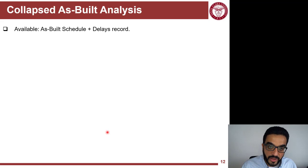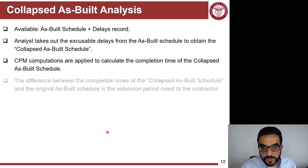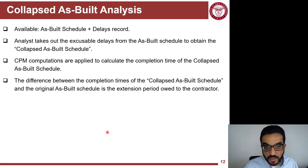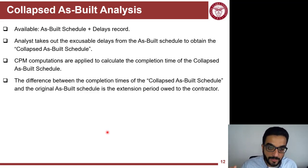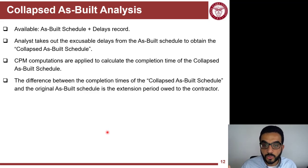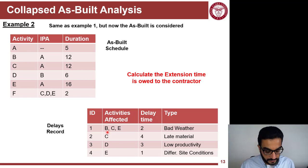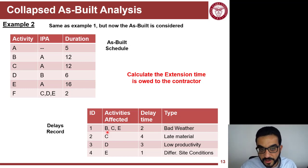The next method is Collapsed As-Built analysis. You need the as-built schedule and the records of delays. First, perform CPM calculations on the as-built schedule. Then remove the excusable delays from it — this collapses the as-built into the collapsed as-built schedule. Perform CPM calculations on the collapsed as-built, then calculate the difference between the total duration of the as-built and the collapsed as-built. That difference is the time extension owed to the contractor.